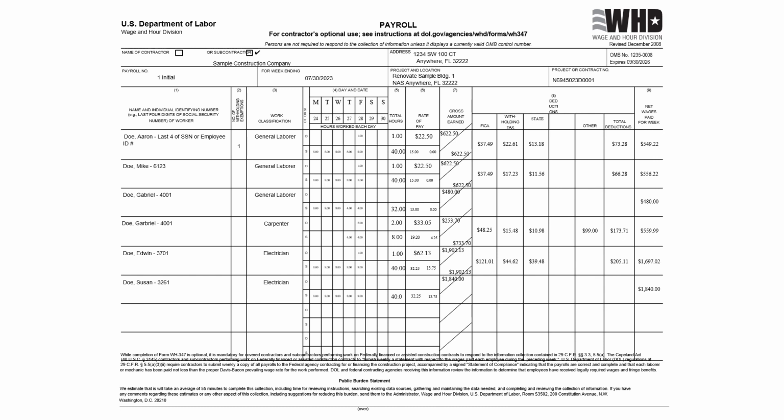Then in the bottom portion of the column, ensure that you add both the top portion of the first trade and the top portion of the second trade in the lower portion of column 7. If fringe benefits are not paid as cash to an employee, enter an explanation on page 2, the Statement of Compliance, signatory page under C, Exceptions. Provide explanations of other deductions on the signatory page.